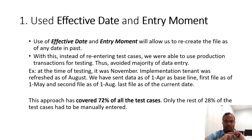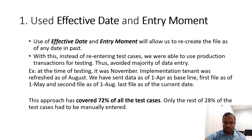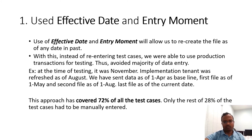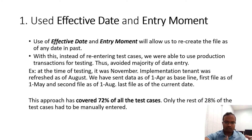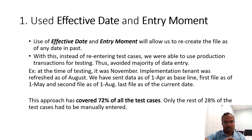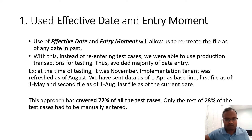Whatever transactions happened in production from April to May — hires, terminations, rehires, leaves, promotions, salary changes, management level changes — we were able to use those for real testing. From May 1 to June 1 there were incremental changes; for example, an employee who went on leave in Round 1 returned from leave in Round 2. In this way I was able to cover 72 percent of total test cases, which was a huge time saver.